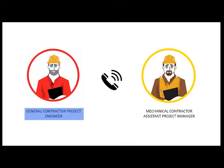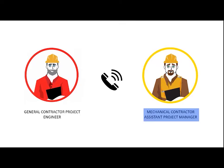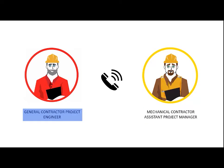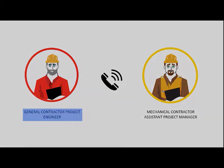Hey, let's get this submittal going. I know you're still going through buyout, but I'd like to go ahead and get all the long lead items out of the way as quickly as possible. Hi, Groofy. We're meeting with the vendor that we will most likely go with tomorrow and hopefully have something to you by the middle of next week. Sounds good. I'll hold you to it. We have to set this equipment with the tower crane, so if we miss our pick date, it'll be harmful to the schedule.